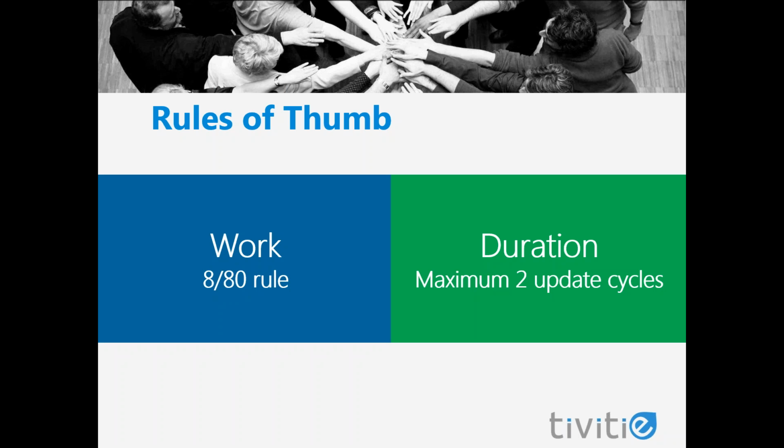These rules of thumb are simply guides to help you think about how much detail to break your work down into. If tasks are broken down into too much detail, you can end up with so many tasks that you spend all of your time managing the schedule data instead of managing the project. However, if you don't break your tasks down into enough detail, you can easily lose visibility to the early stages of a problem occurring.